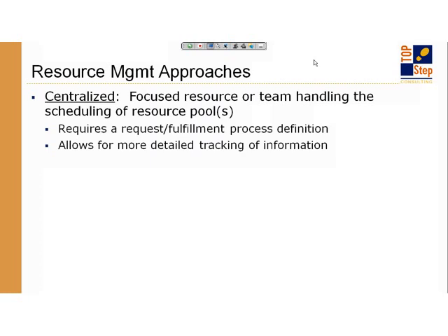So because they're focused so much on this topic, and by no means is this a small function, but because they're so focused, they can actually control data at a more detailed level. You can actually get more detailed tracking and more process workflow differentiation, such as maybe not signed contracts or tentative resource scheduling versus requesting versus committed or firm, that kind of thing. So with a centralized team, because they're focused on that one aspect of the process, you can actually have more detailed tracking.